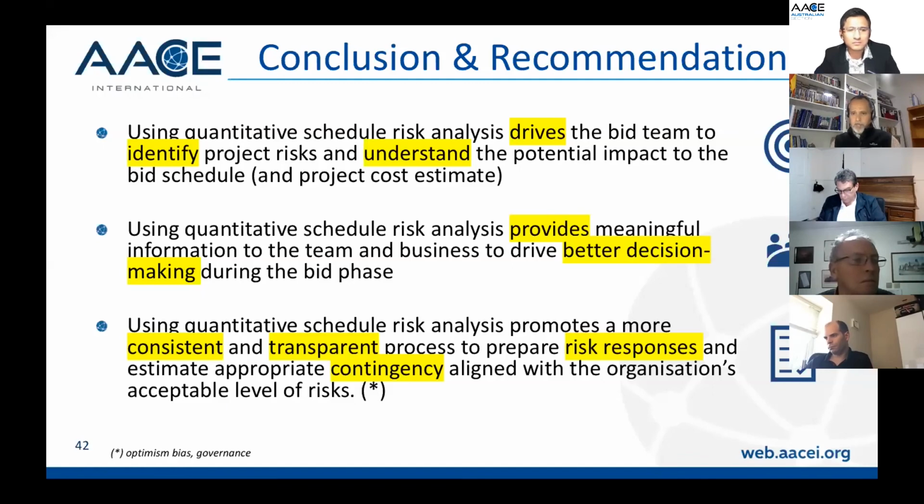It also depends on the type of project. So if you're in a more horizontal project, building a refinery or a chemical plant, I guess the impact is probably less than if you are in vertical construction, like a residential tower, because you probably need to use the hoist, getting materials and labor on the hoist to get to the different levels. So this is going to have a big impact on your productivity.